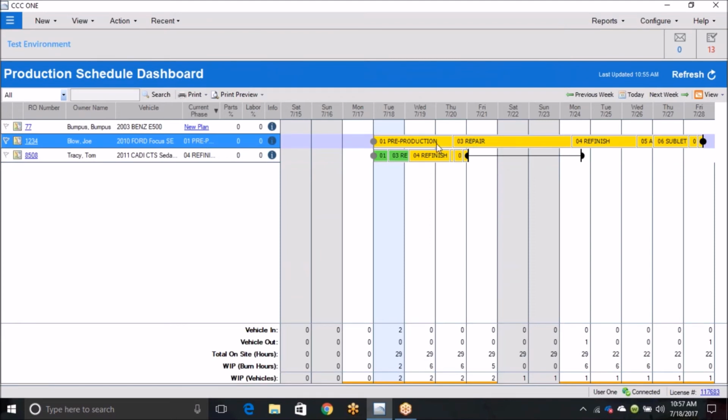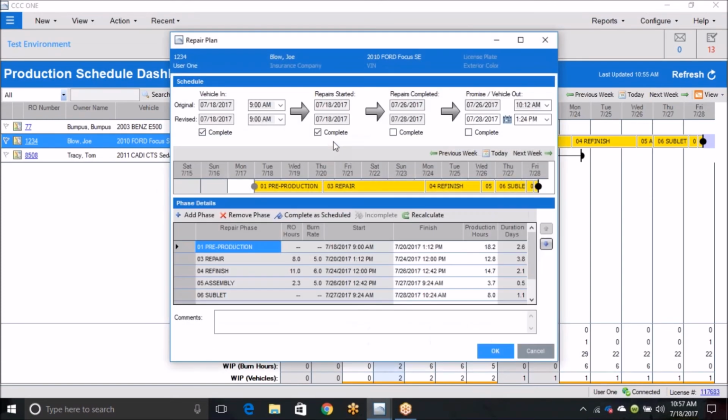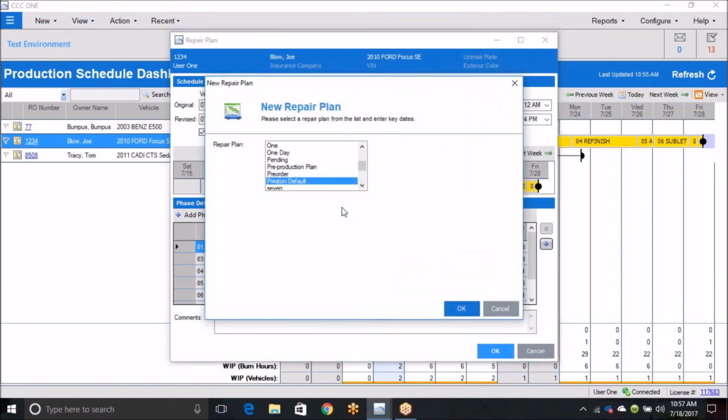Okay, so here's something else I want to show you. Oftentimes people will create a repair plan before the vehicle goes into the blueprint department. So what happens when you blueprint a vehicle? Usually add hours, right? You make the repair plan more accurate. And so instead of leaving the repair plan as it was with the inaccurate curb-written guesstimate, I recommend that after blueprint, you always recalculate these plans, right?